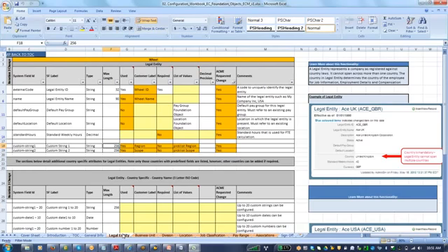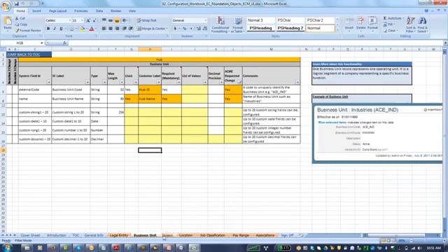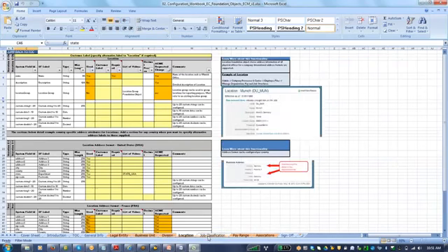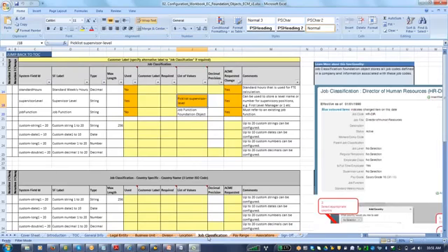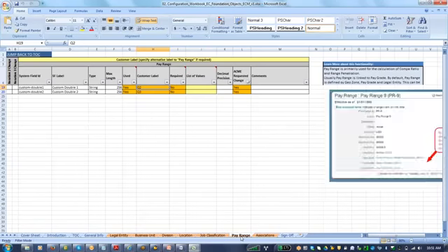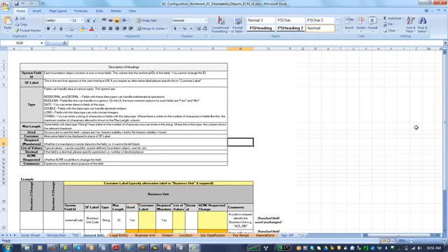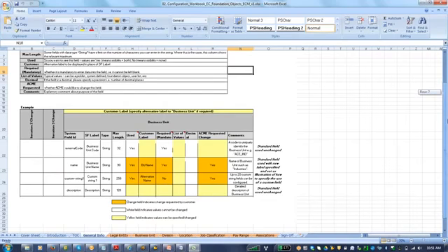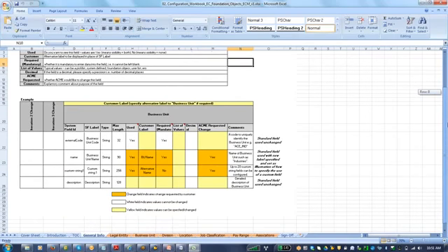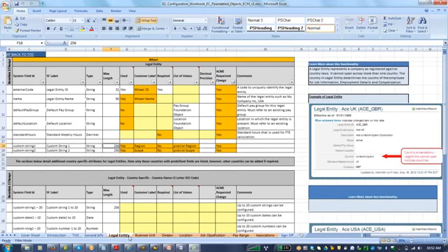What are the different roles? What are the different groups? What are the different permissions? In detail, who, with different roles, will be accessing what? You have to capture everything in detail, including the different pick lists, of course, and you have to take the sign off. Only after taking the sign off will you proceed to the realization phase.